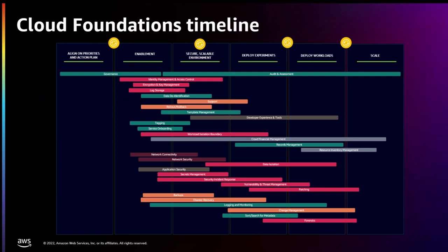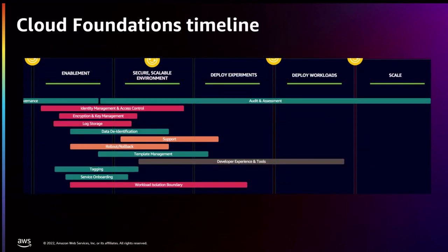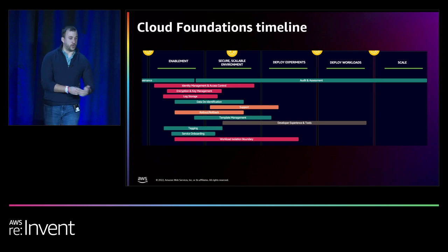And from here, as you can see, somebody might start building the identity capability, establishing all those things. And from here, you move to do something else in parallel. It's not just a sequential build. For example, you establish access, you set up your tags, and now that you have tags in place, you can use those tags to use identity and implement attribute-based access control. Or you deploy your network and then you can secure it.